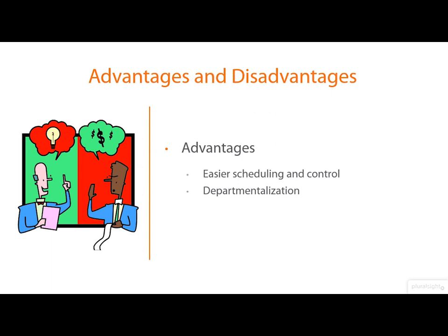If any of these departments can't deliver on time for various reasons, it is easier for a project manager to adjust their overall plan. Unfortunately, in reality, I've seen a plan adjusted where the implementation phase gets squeezed more and more, which means the development team has less time to deliver a working solution, and this can mean that quality suffers as shortcuts tend to be taken. In my experience, it's normally code-based unit and integration testing that gets affected first. This has a knock-on effect that the testing teams in the test phase get a solution that contains more problems, which makes their lives very hard.